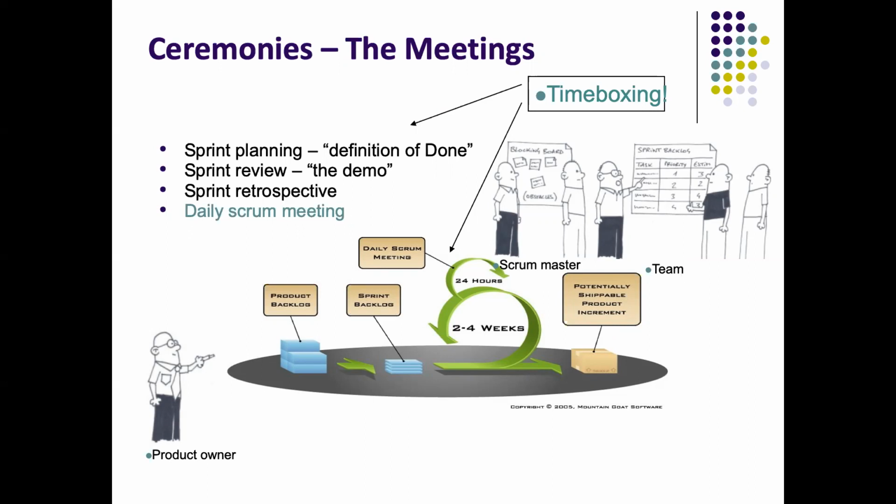So again, to reiterate, the product backlog has a prioritized list of items that need to be developed, right? The product owner has already done that. As part of the sprint planning, you will pick the top priority items which you think should be done, and then you will estimate how much work it is, a small item or a medium item, and how many items you can pick based upon the capacity or velocity of the team.